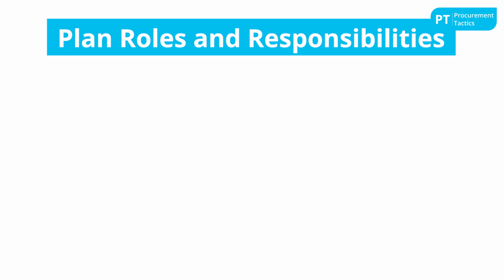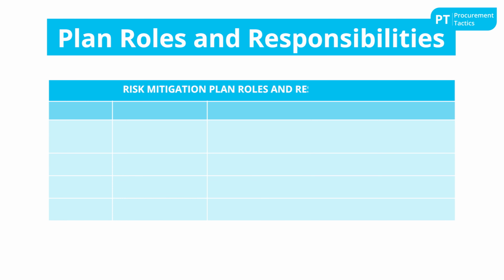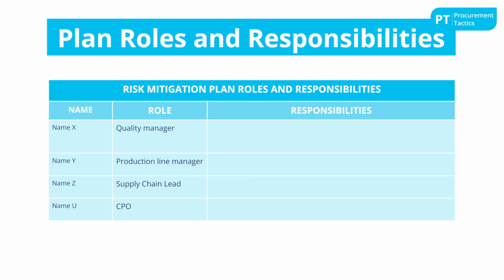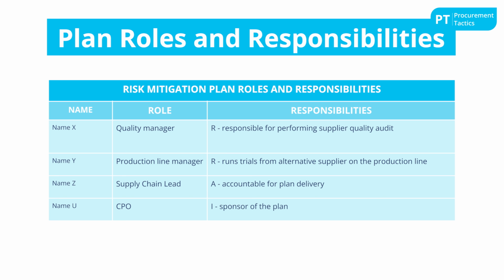Plan, roles, and responsibilities. This section defines the roles, tasks, and deliverables designated to the team members. In a risk management plan, these factors may align with specific risk scenarios identified by your team. Initially, the team clarifies project roles and determines the risk management tasks or outcomes necessary for the project. Next, you can go through the list of tasks and assign each one to a person on the team to hold responsible for managing it.